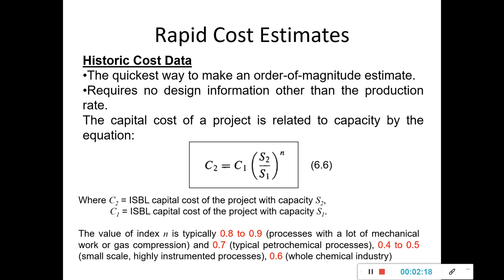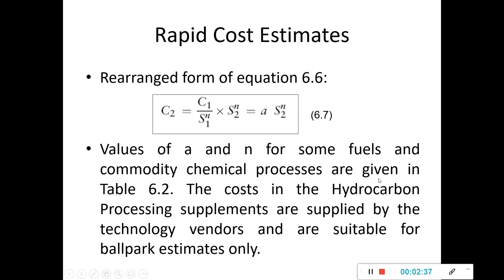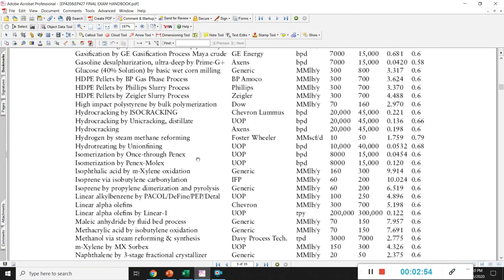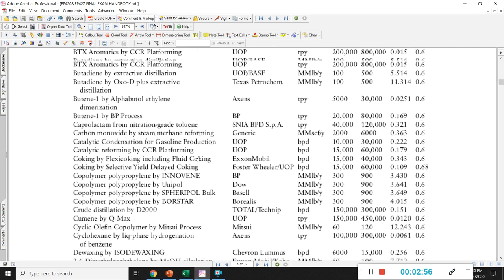The values of the index n are: 0.8 to 0.9 for processes with a lot of mechanical work such as gas compressions; 0.7 for typical petrochemical processes; 0.4 to 0.5 for small scale and highly instrumented processes; and 0.6 for the whole chemical industry. We are referring to Table 6.2, where values of a and n for fuel and commodity chemical processes are given.